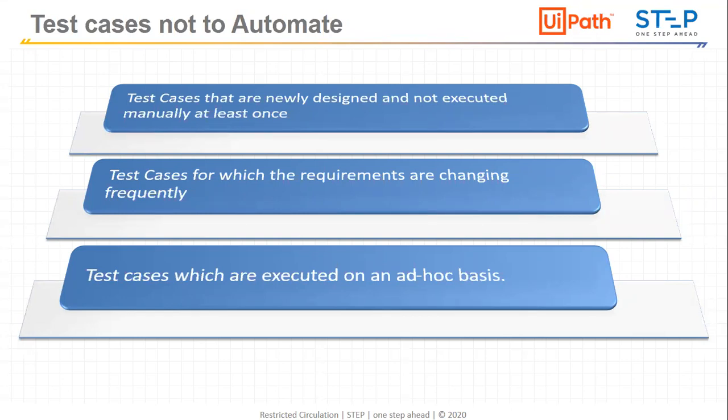So we can keep those test cases aside. We can park those test cases and tell the client that these are changing functionalities, and we cannot take those particular test cases for automation for now. After everything is done, changes are fine, like 20% changes can be tolerated, but 80% changes should not be there. So this type of test case is not suitable for automation.